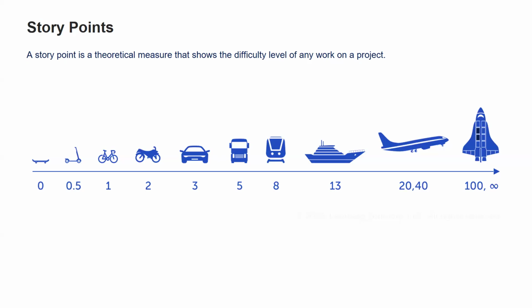So normally story points depend on time. I mean, the story point is governed by time also. Normally a story point means 2 hours in some organizations. In some organizations, it's 4 hours, right?